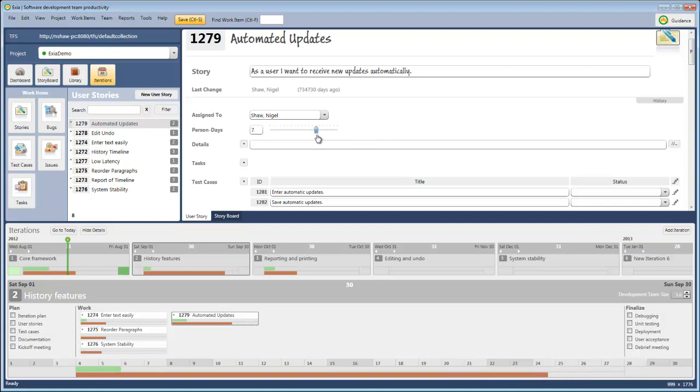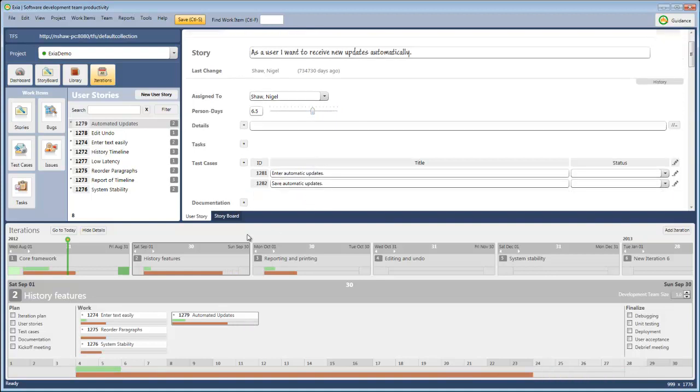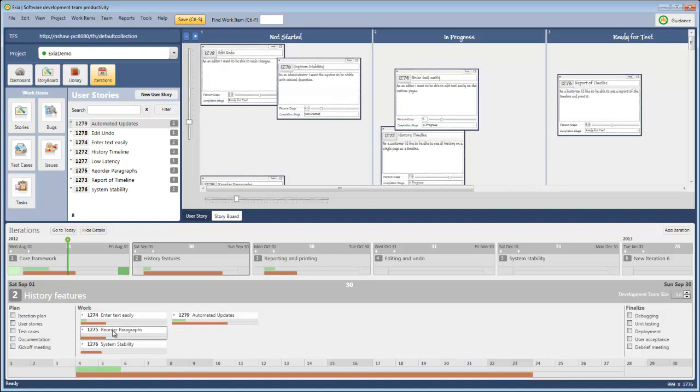status reflected right away. You can even go so far as to flip over to the storyboard and double click on a story, see it highlighted in the storyboard, and as we move it across the storyboard, imagine now that I'm synchronizing with a real world board, maybe sitting in a war room and trying to make this storyboard look like the one on the wall. I just move the cards across to reflect the wall board, and right away my status is updated. You can see the green bars jump down below. So for instance, your remote team in India would be instantly updated with all this status.